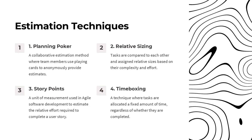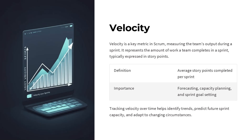Planning poker is a collaborative estimation technique where team members use playing cards to anonymously provide estimates for tasks. Relative sizing involves comparing tasks to each other and assigning relative sizes based on their complexity and effort. Story points are a unit of measurement used in agile software development to estimate the relative effort required to complete a user story. Time boxing is a technique where tasks are allocated a fixed amount of time, regardless of whether they are completed. Velocity is a key metric in Scrum that measures the team's output during a sprint, typically expressed in story points. Velocity is important for forecasting, capacity planning, and setting sprint goals, and tracking it over time helps identify trends, predict future sprint capacity, and adapt to changing circumstances.